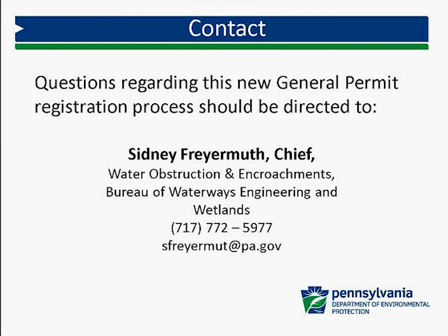Why are project description item 3 and project purpose item 6 separated? Couldn't these be listed in the same attachment? There is room for description on the application, but there's no room in the application for project purpose. We wanted them separated so you would describe your crossing and then describe the purpose of your crossing separately.